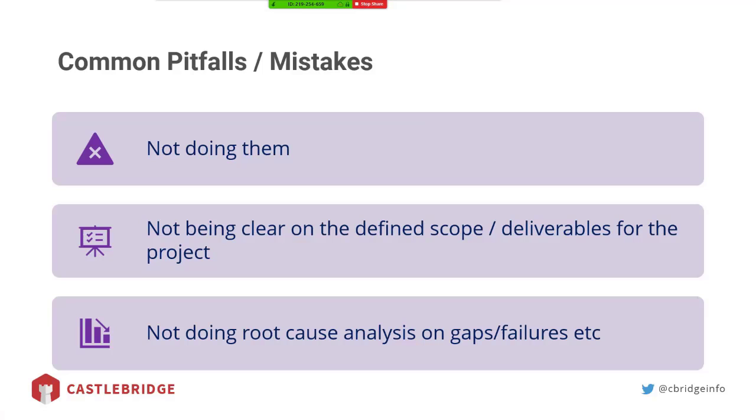In terms of pitfalls and mistakes, the most obvious pitfall is not doing a post-implementation review. And we see this more often than I'd be comfortable with as a former program manager in telco sector. Another key pitfall is not being clear on the defined scope or deliverables for the project. So again, part of your post-implementation review will be simply saying, this project wasn't clearly spec'd, so no one knew what it was they were supposed to deliver.